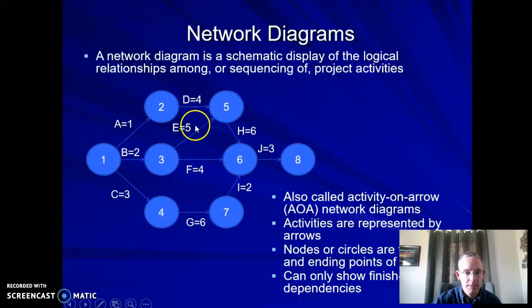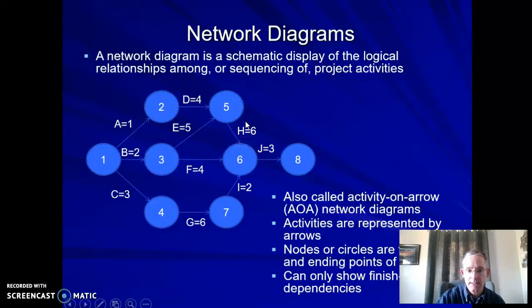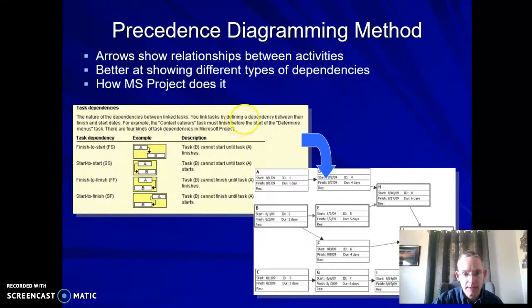So what happens is you build basically a critical path that says the longest thing that's going to happen is this line of tasks right here. That's going to take this particular line. So now you can start to see there are some critical paths that if I work to that length, I can reduce the overall duration of the project.